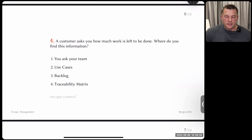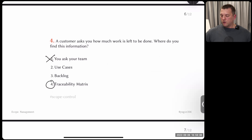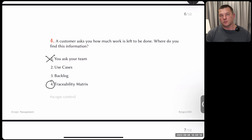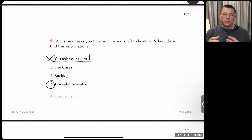Next question: a customer asks how much work is left to be done. Where do you find this information? The right answer is traceability matrix. Asking your team is completely wrong — they are not managers, they don't care about the big picture. They can only tell you what they're working on right now, maybe that their current task will finish in three hours. But the customer is asking about the whole remaining project, possibly another year of work.